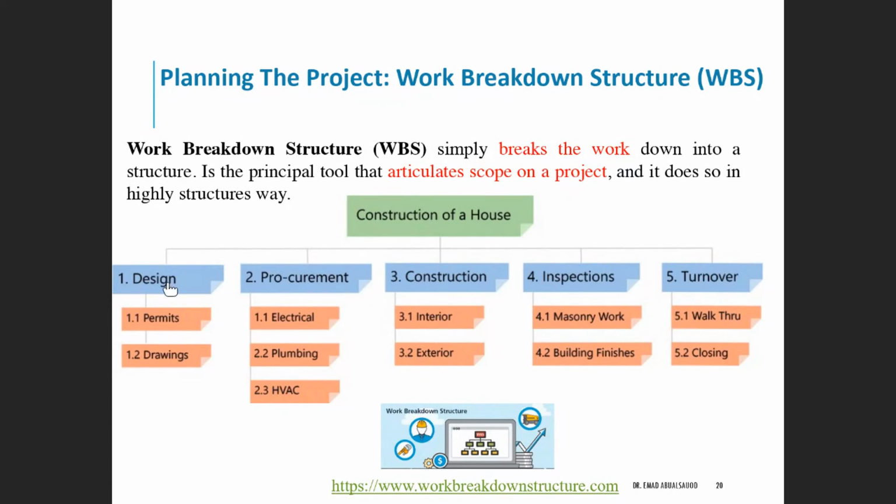Design for the house, procurement, construction, inspection, turnover. These will be the main activities. And then under each of those first level activities, we will have other sub-activities.